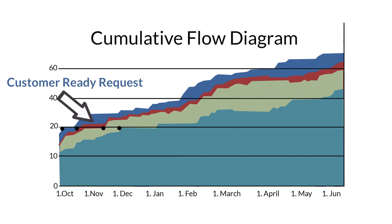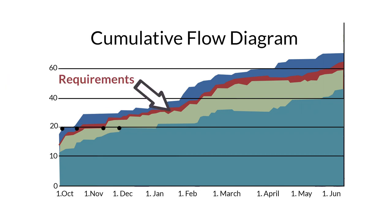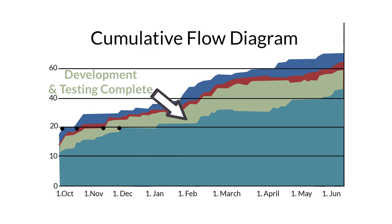The diagram shows data in an area graph displaying the total volume of work for any of the process stages. In this example, the software development company has four stages that become our four areas of the CFD. These are customer ready requests in blue, requirements set in red, and development and testing complete in green.